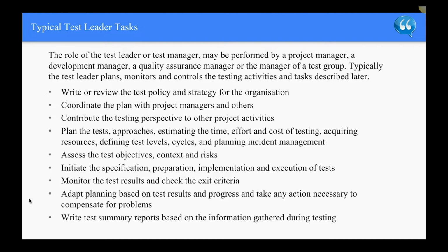Monitor the test results and check the exit criteria. Adapt planning based on the test results and progress, and take any action necessary to compensate for problems. Set up adequate configuration management of testware for traceability. Introduce suitable metrics for measuring test progress and evaluating the quality of the testing and the product.